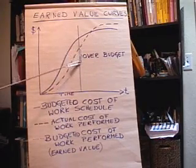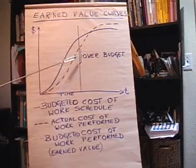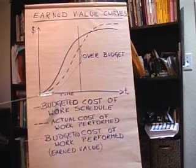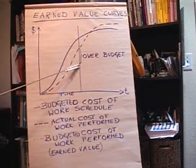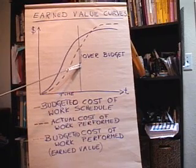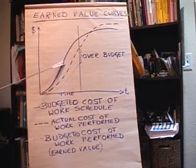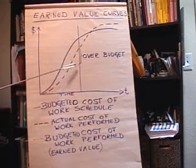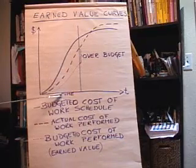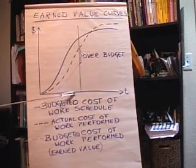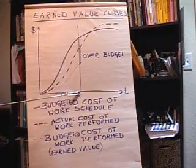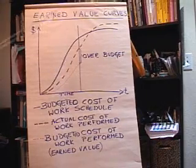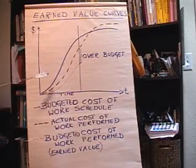The second thing we can see, besides whether we're above or over budget, is whether we're ahead or behind on the project. You can see here that we're actually behind, because our earned value according to the budget is at this level, but we should have had that level back here in that earlier time period. The amount that we're behind is the difference on the time axis between those two points. So depending on the relationship of these three curves, you can answer the two questions: are you over or under budget, and are you ahead or behind on your project?